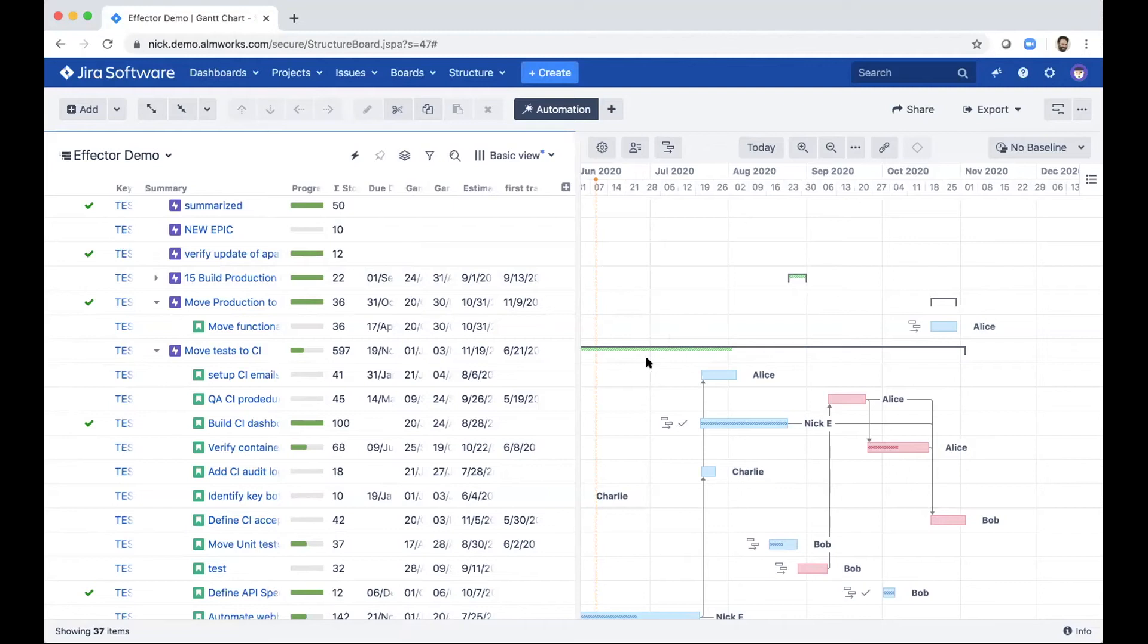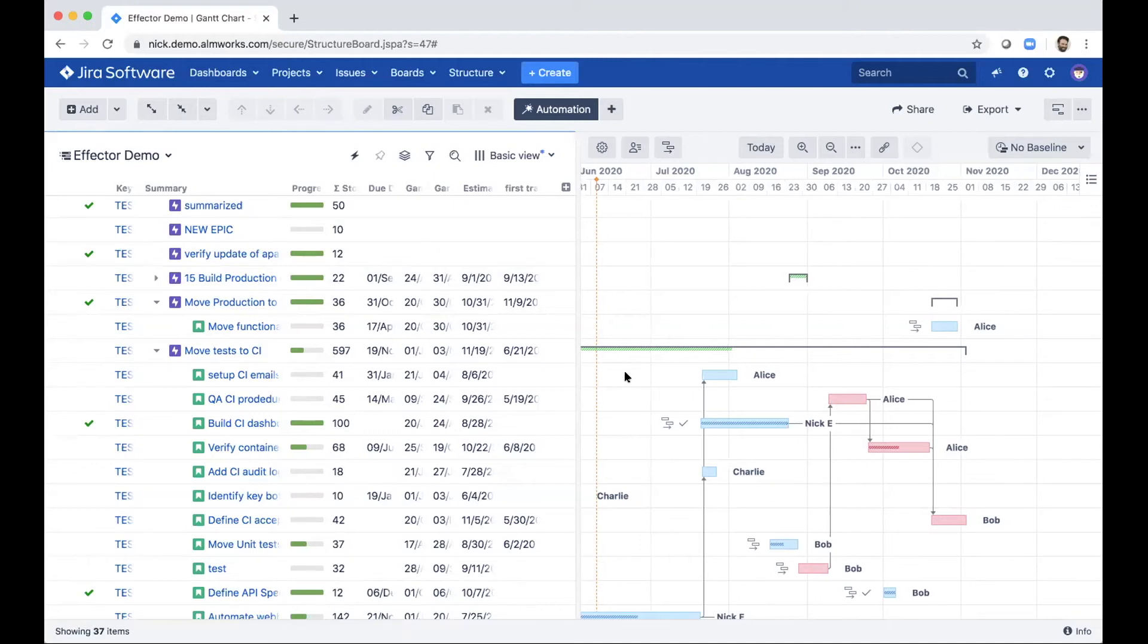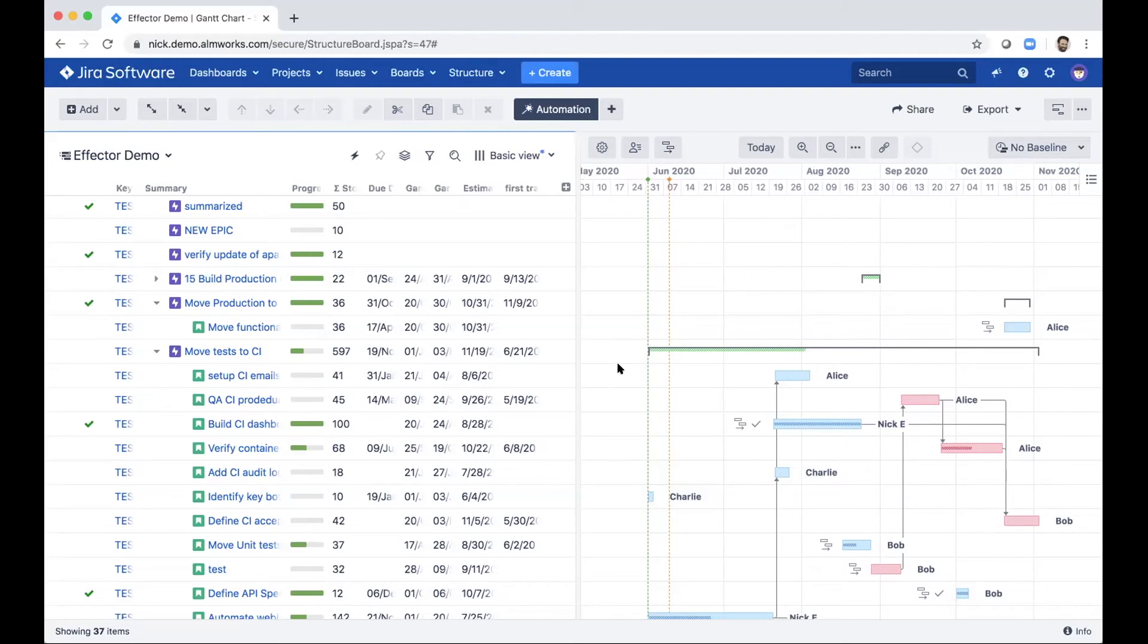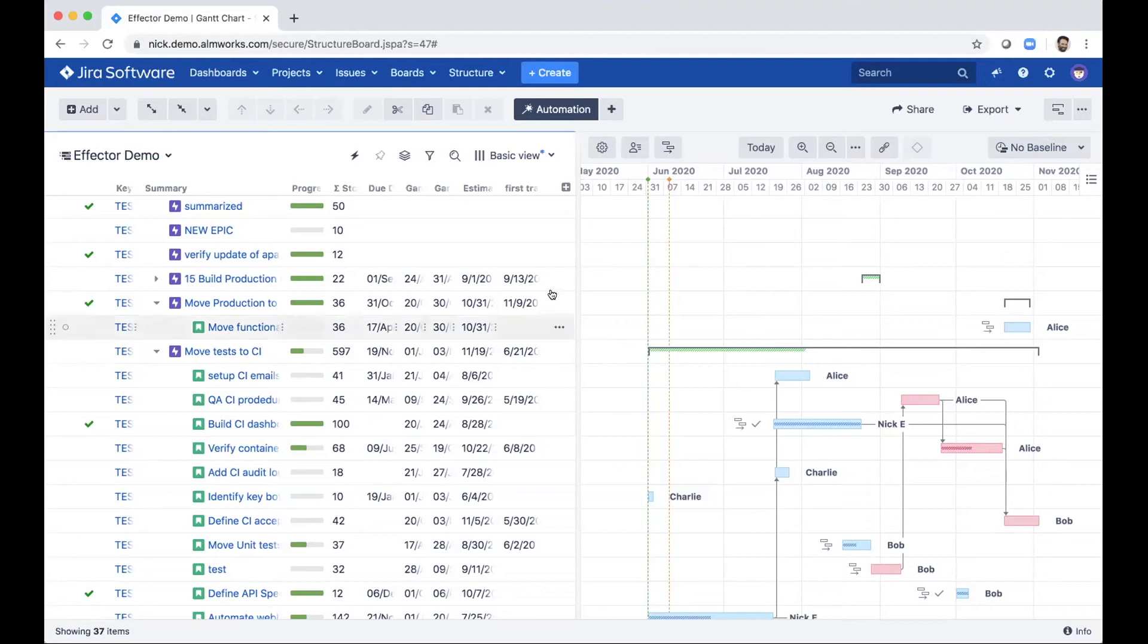So we can take things like the first transition into progress, and we can use that as the start date. So as soon as this issue was transitioned into progress, this is when it really started. And then we can also use the resolution date and say, this is when this issue really ended. And then we can look back before today into the past and not see a plan, not see a hypothetical of how things are going to play out, but we can see how the real work was done when it really started, when it really finished, how much time it actually took. And I think it's very useful for that kind of reverse planning aspect.